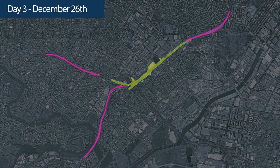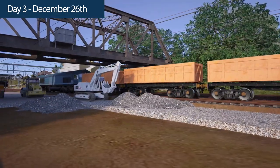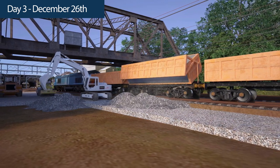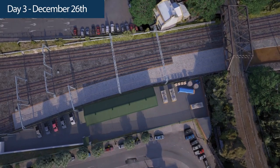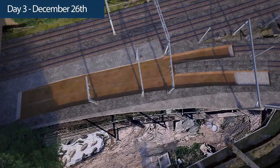Bankstown lines. At the countryside of the station, the excavation will be completed with the spoil trains, followed by installation of capping and bottom ballast using the 3rd engineering train. Bottom ballast will be reloaded using the train at 2 local stockpile sites, St Peters and Way Street.